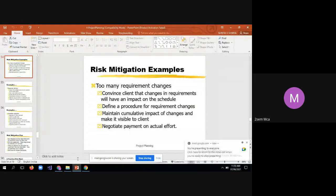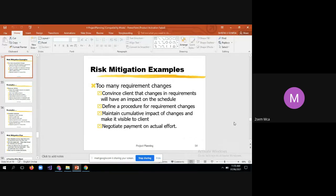Let us see some examples of mitigation plans. Yesterday we discussed the issue of too many requirement changes. The example mitigation plan for this issue is: you need to convince the client that coming with new requirements in the middle of the project has an impact on the overall budget and may delay the delivery schedule. That is one mitigation plan. You also have to define a procedure for requirement changes.